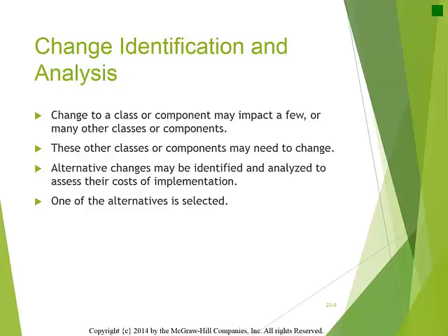In this case, these two alternatives should be identified, and changes identified are analyzed to: 1. Assess the change impact, that is, which other components will be affected by the changes made to a given component. 2. Estimate the cost and time required to implement the changes and test the result. 3. Identify risks and define solution measures.